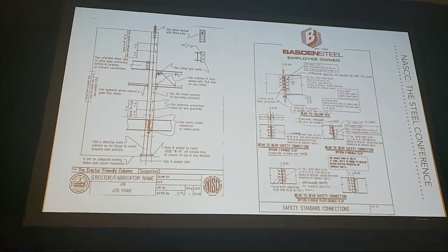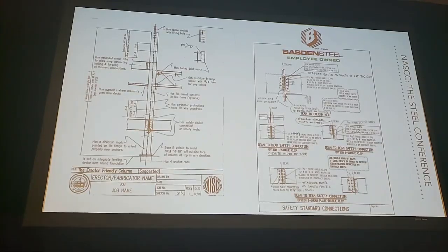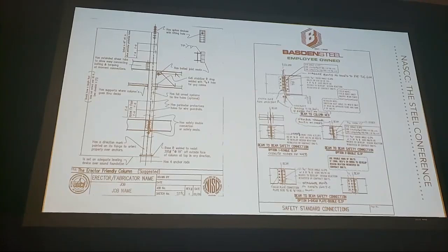they're gonna have the same hole pattern, and you're only gonna put a seat on one side, you need to tell the erector on the drawings which side, how he needs to start the building. How would you know that? Because of the sequence. Myself, I prefer just put it on both of them. It doesn't cost that much more money. You've already punched this hole here, so just give another angle, and then we don't have to worry about it. We have to switch back and forth.